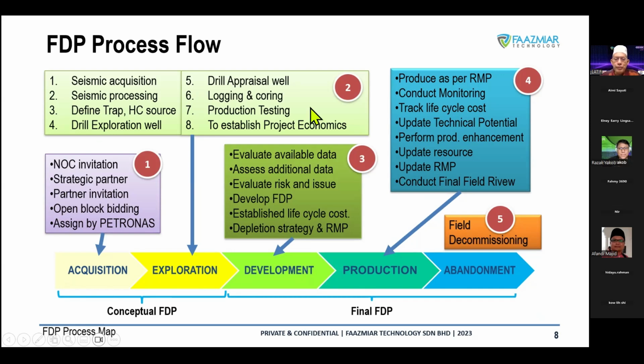For number one, we are talking about acquisition. A national oil company will be invited for the bidding, and then we find partners to get involved with this investment. We invite the partners to be involved in all the discussions, and of course everything will be submitted to Petronas for approval. Then for number two, we start to do the seismic, starting with processing, then we define the trap, do the exploration well, then continue with the appraisal well, and then link the data from the wells to the seismic.